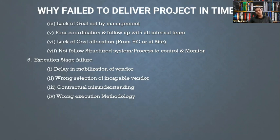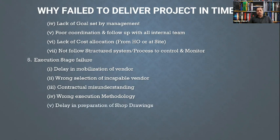Going back to the client or consultant for re-approval takes more time. If wrong execution has already happened on-site, there is rework involved. Another cause of delay is the delay in preparation of shop drawings. For example, in HVAC and firefighting — specifically sprinkler locations — you need to prepare shop drawings using software from the vendor doing the work on the ground level.